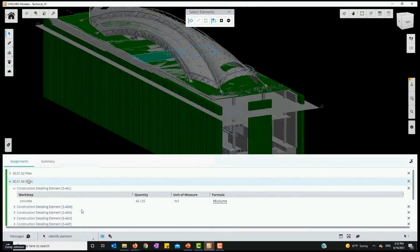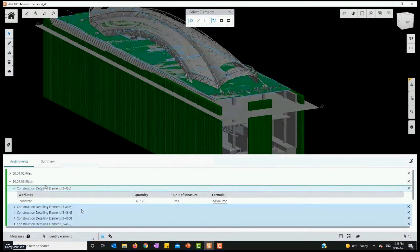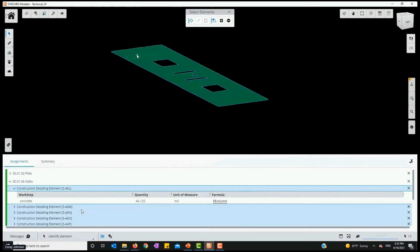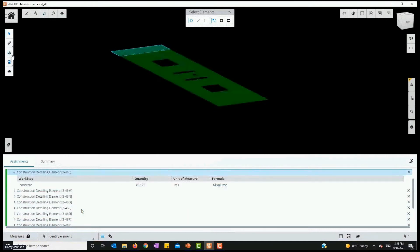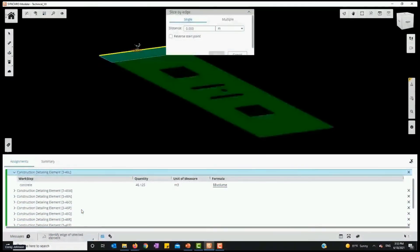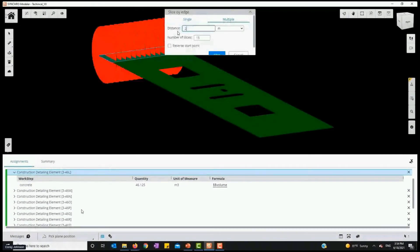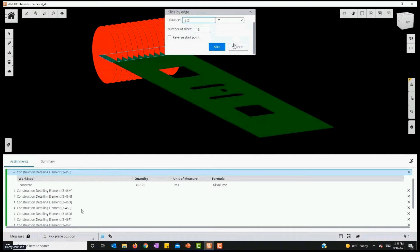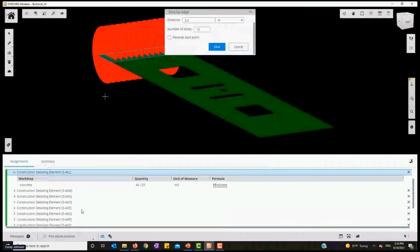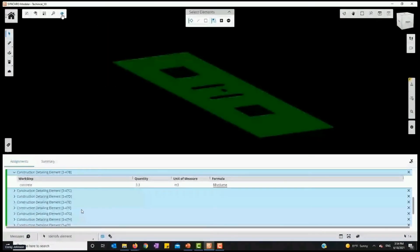And that's important because we never want to change the design intent. We are adding data. So now I have this model and all those pieces. I can even split it again. I can split that end into individual pours, and again, very quick. We even have an undo - we can undo this if needed. Now this is important because now we have this big slab and I can break this down into however it needed to be broken down into and get accurate quantities.